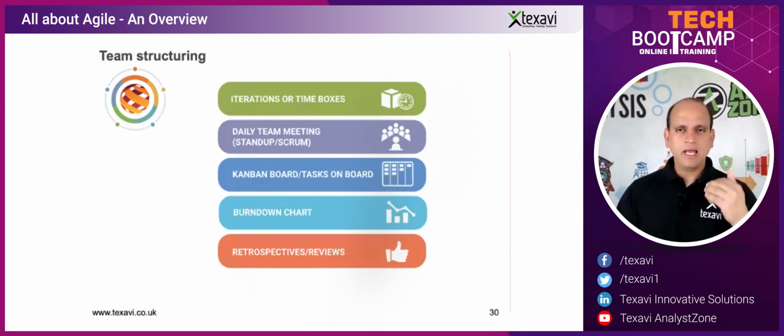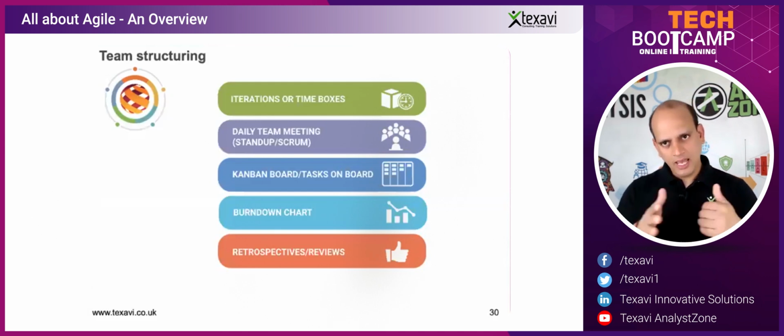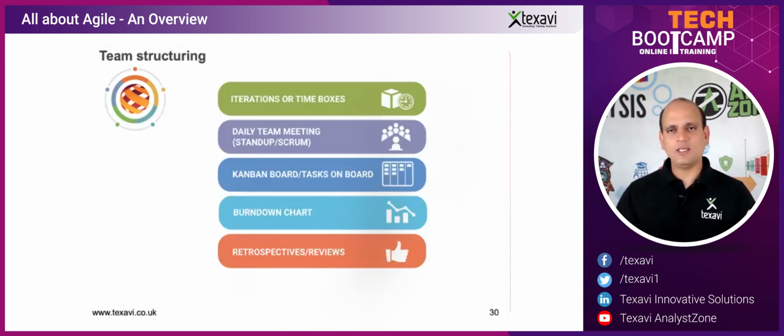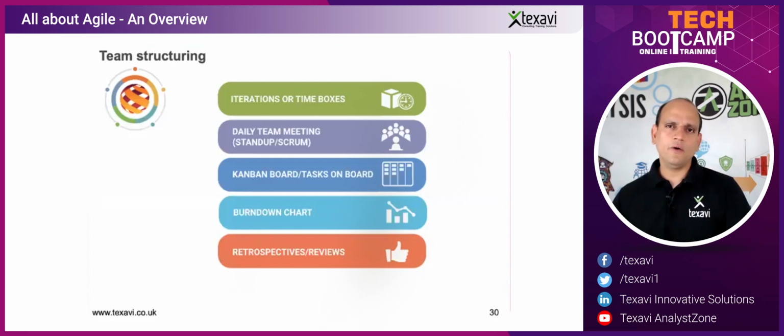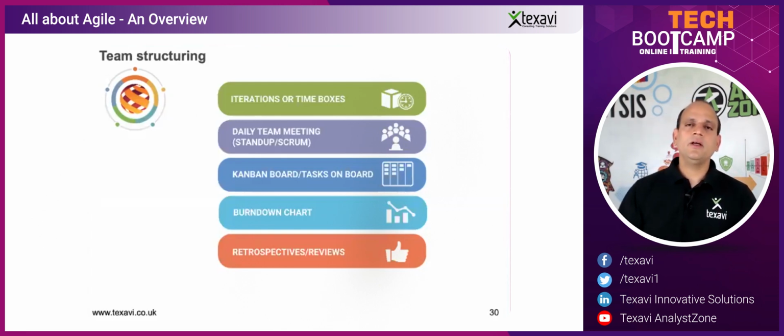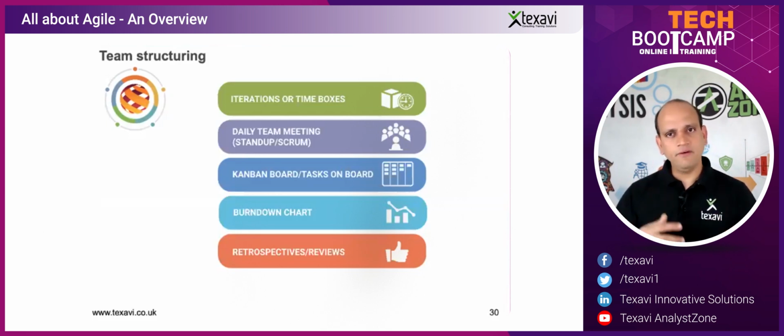Sprint planning happens before the sprint. Sprint execution happens as the sprint is working. That's called sprint execution: the development work and the analysis and the design and the architecture. And then once the sprint is completed, which is after the end of 2 weeks or 3 weeks or 4 weeks, whatever your time box is, you do a review of how the sprint happened. What is the output? What is the outcome of that particular sprint? You show it to the customer, and you can have a showcase or a demonstration at the end of that. And if they say, fair enough, then we can push it out.